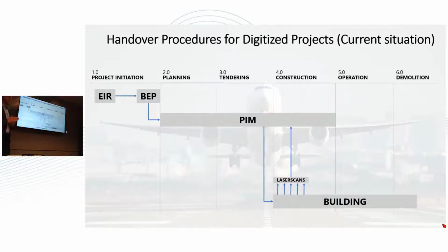Technology is really important here, because there are several systems for laser scans, and you can get results really fast. When you have a scan in the morning, by tomorrow morning at the latest you have time to react if there is a problem. So you need to scan and analyze, and you have more or less 6 hours.